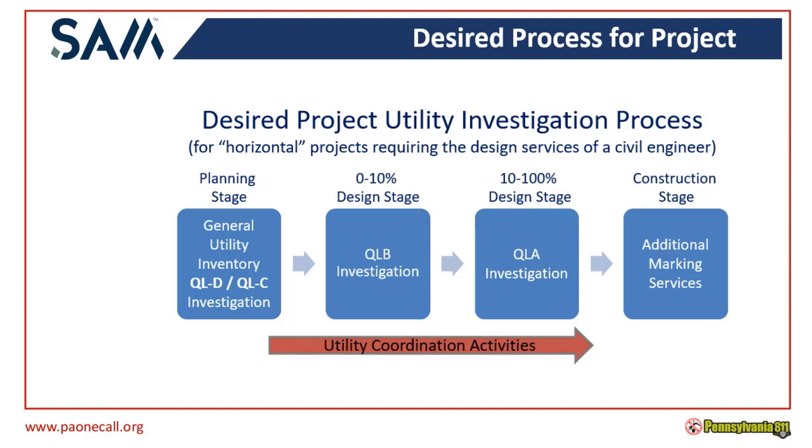And then in the construction stage, I know a lot of people don't think of SUE still. You still always have to call on your PA One Call. That'll never change. But you could also call us back in and we can come back out and remark some of the stuff we do. Again, my point to that would be the private utilities. If there's a private utility that's owned by a certain person or something like that, Pennsylvania One Call won't have that marked out. So that's where we could step in and help you guys out, mitigate that risk and mark out private utilities.